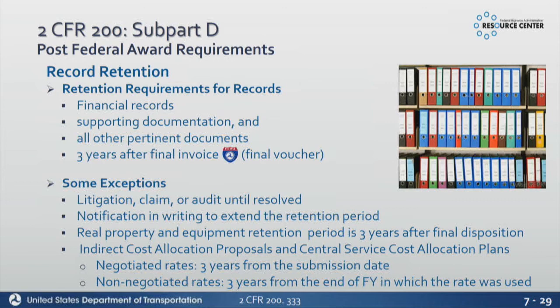So as I said earlier, sometimes we've seen where local governments will think that they're done because they got their final payment from the state. They start their clock, they go 3 years, they throw away all their documents, and that project's still sitting open and active in FEMAS. And if we pull it, because we usually don't pull closed projects, but when we're doing a review, we'll pull active projects. And it's happened where we went out, asked for their documents, and they said, well, we were done with that project 4 years ago, and we threw away our records, and they got stuck holding the bill, though the state picked it up, because the state was the one that didn't actually close the project in FEMAS. But it's a big deal.